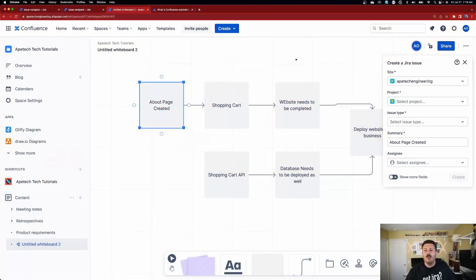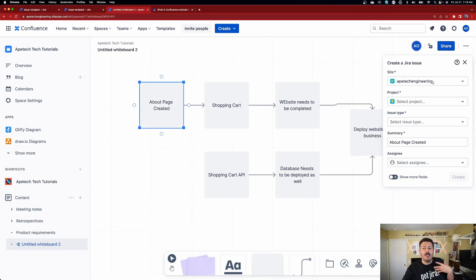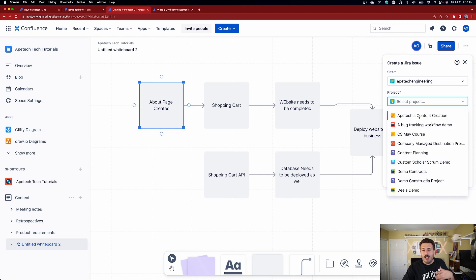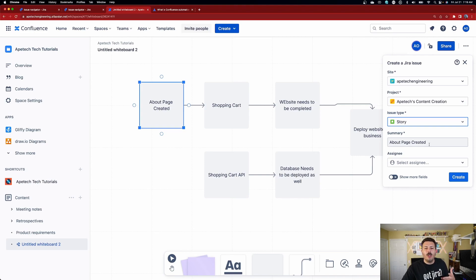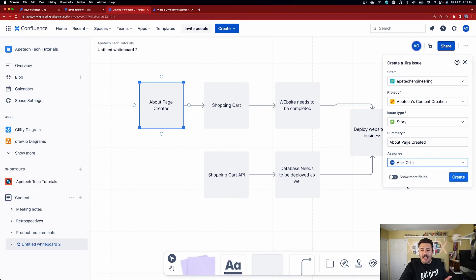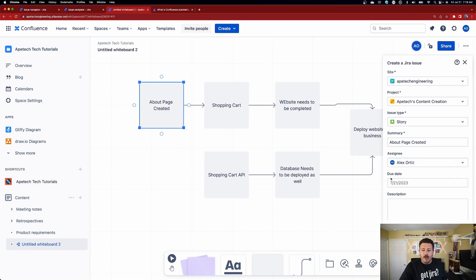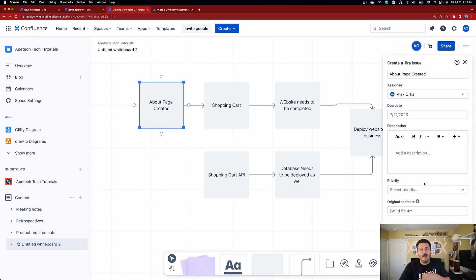Keep in mind this is a feature that is built into the whiteboards capability. When I first saw this at Team 23, my mouth completely hit the floor because it is really, really powerful. So you click on "Create an issue" — it's going to ask which instance of Jira you want, then you pick the project, then the issue type — this is going to be a story — then you give it the title. It's doing it all for you, just grabbing whatever's on that sticky note. You can assign it to somebody as well, and you have the option to show a couple more fields for this particular issue type and project.